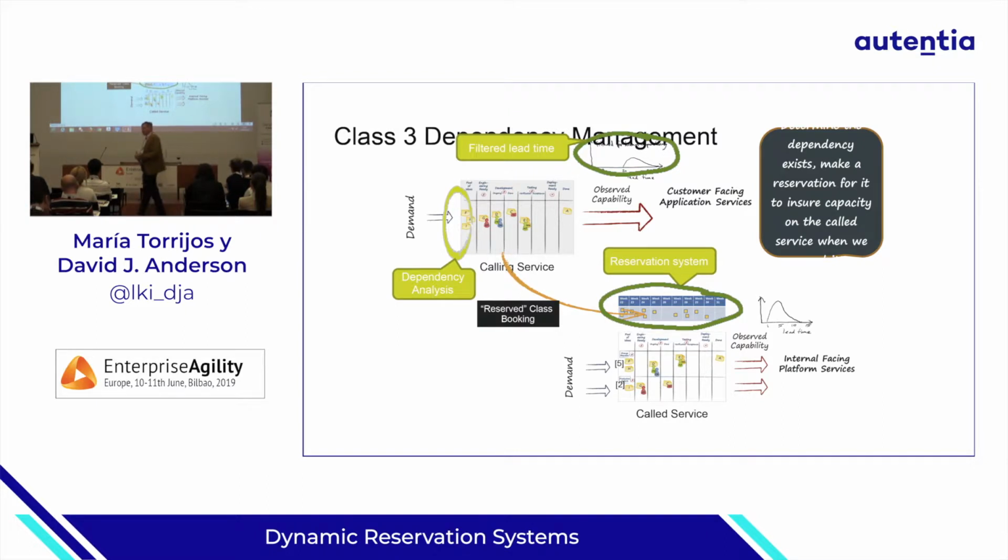Now, is that a hard reservation? Not really. You've only got 50% probability. So you want to send a message to the photographer, we might want some of your time on week 26.